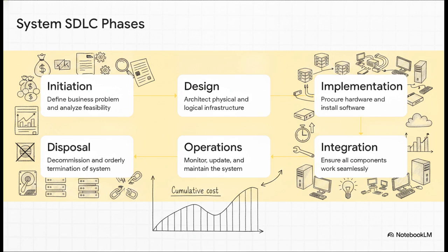And it's super fascinating to note that according to the Institute of Internal Auditors, up to 80% of the costs and time spent on a system over its entire life cycle actually occur in the operations and maintenance phase, well after it's been implemented. And finally, it ends with a formal disposal or retirement of the hardware and data.